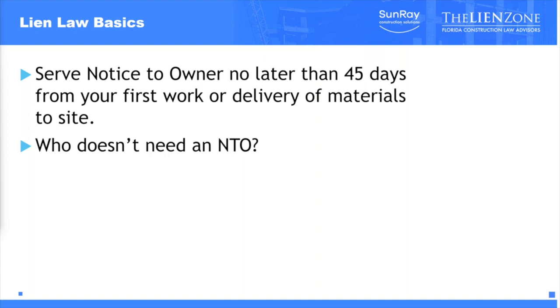The notice to owner is not required if you are in a direct contract with the owner. That being said, our advice generally is you should have a process in your office to serve notices no matter what, especially if you do work where sometimes you're a subcontractor, maybe sometimes you're a sub-sub, maybe sometimes you have a direct contract with an owner. So instead of trying to figure out when you need to serve what document, you would just have a process in your office. Every time we sign a contract and it's over this amount of money, we're going to send a notice to owner.